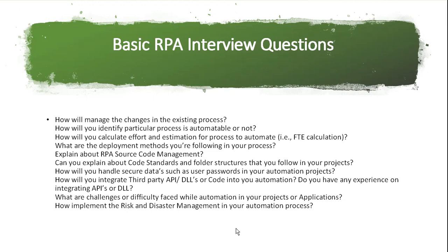It will come up with a change request, CRQ. Once the change request comes, it goes to your process owner, solution owner and business owner. Everyone will discuss each and everything, and after that they will come up with a TDD, or if it is a big change, they will come up with an STD change and a TDD change, and again come into development. If it is a small change, only the TDD changes.